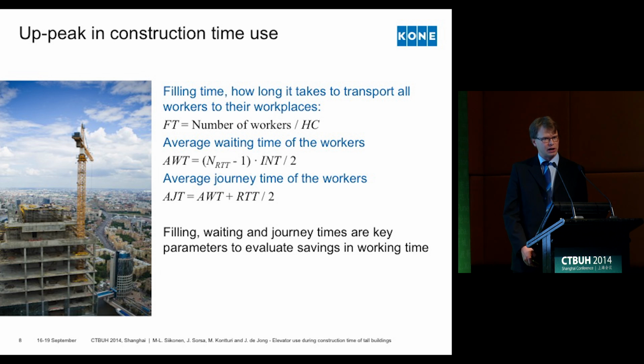Average waiting time and journey time are parameters that can then be used to evaluate potential working time savings for a particular vertical transportation solution.